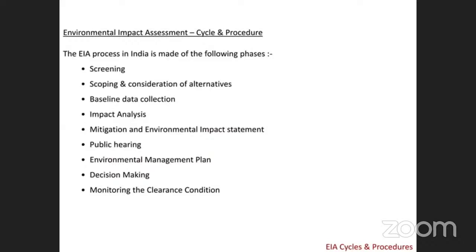The project plan is screened for the scale of investment, the range of investment of the project, and location of the project, and which developmental activity is being considered in this project. Whether the project needs statutory clearance or not will be decided in the screening stage.